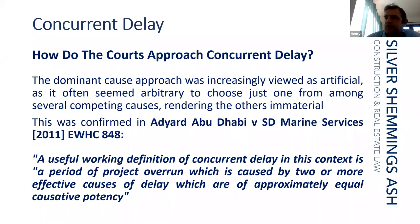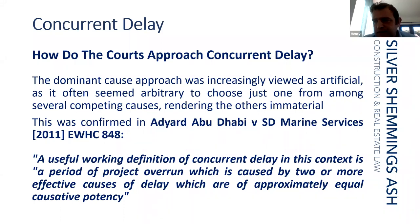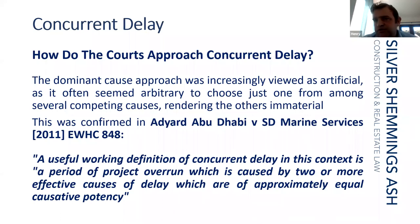The dominant cause approach was increasingly viewed as artificial; it often seemed arbitrary to choose one from among several competing causes. This was confirmed in 2011. A useful working definition of concurrent delay in this context is a period of project overrun caused by two or more effective causes of delay which are approximately equal in causative potency. That word 'causation' comes into play, and these are the types of points that matter when drafting and before parties enter into agreements.